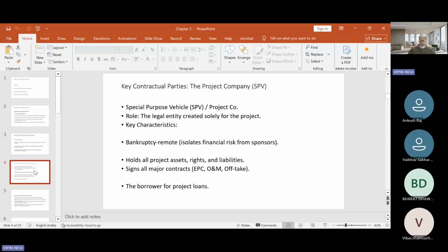Particularly, if we talk about power projects, suppliers of raw material for power production are critical. Equipment suppliers are critical in power projects, and sometimes there is a huge delay in the supply of supercritical equipment, particularly for power plants. So as power plants get delayed, equipment suppliers are sitting on overcapacity and a meltdown in their order books.